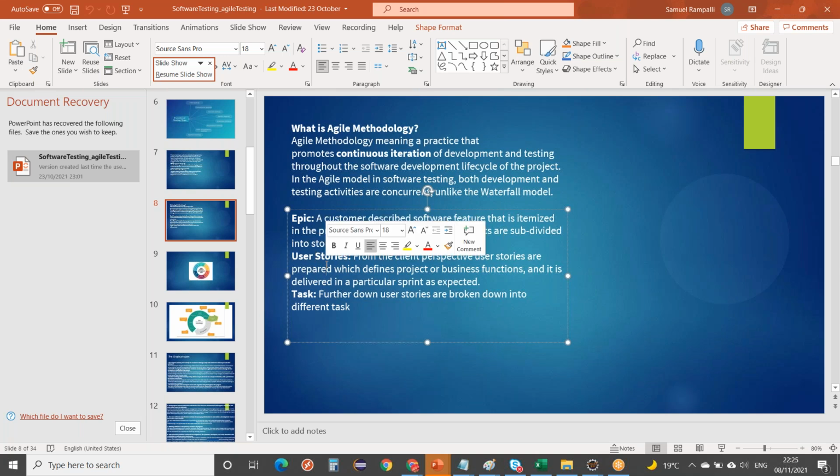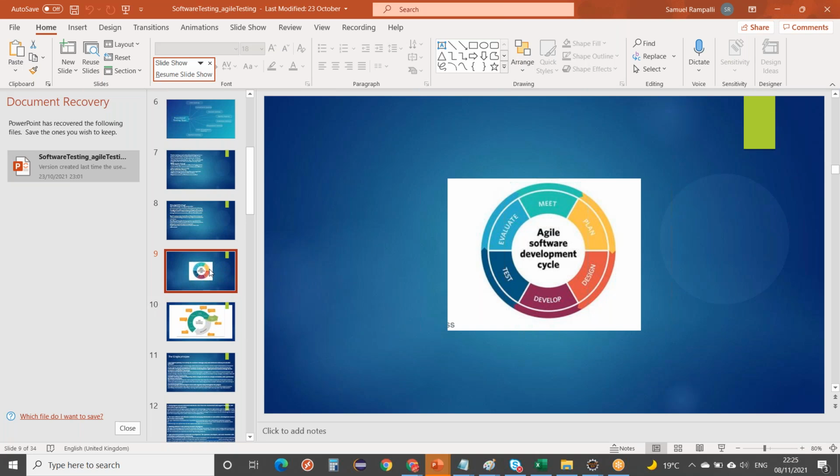And then in each sprint, what does that mean? Iteration. One iteration is called a sprint. One iteration is 2 weeks to 4 weeks. The timeline we have in Agile is 2 to 4 weeks as the sprint duration. In industry, the standard followed is around 3 weeks or 4 weeks of a sprint. Okay, so if your project is complex, they will follow 4 weeks of a sprint. It means in a month you have to finish the sprint.